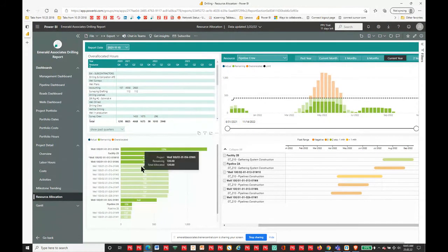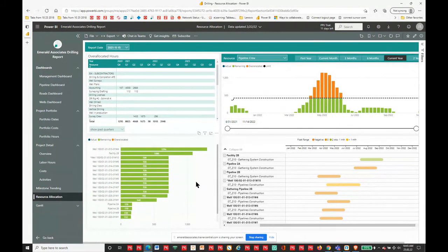It's smaller projects, albeit, but high priority. Okay, if those are my priority projects, they all come in within the availability I currently have. So that's useful information to know, because then you know if these are the next level projects you are introducing, maybe they need to move, maybe you need to look at increasing your pipeline crew, any of that sort of scenario. So you've got a lot of very good information.